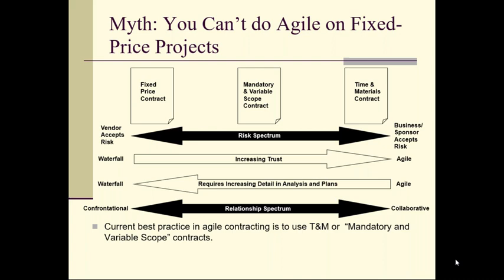So that's the idea. The work order model puts aside a budget for interior finishing of the executive suites. We gave them a price for carpet and tile and hardwood. We priced in maybe carpet, but we gave them the other prices. And if they change their mind and decide to switch to hardwood, that's fine. It uses more points. They'll have to shave off points somewhere else. So instead of having a chandelier in the executive washroom, they're going to have to drop that to save some points to help pay for the cost of hardwood being more expensive than carpet. So it's a matter of trade-offs.